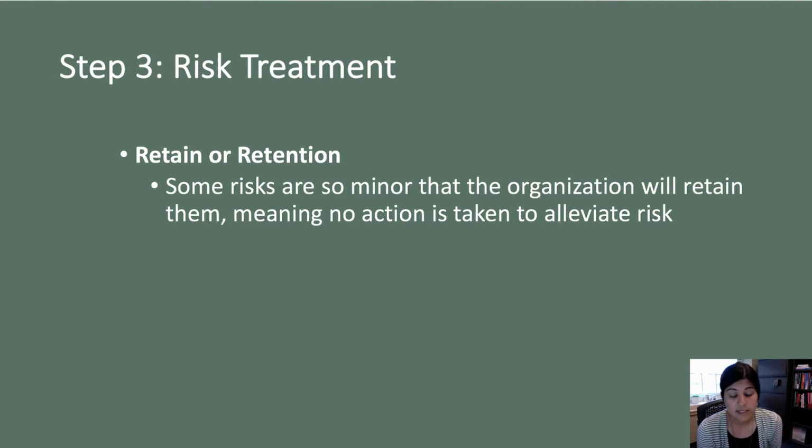So instead of taking action to reduce or eliminate or transfer that risk, we're simply going to retain it, right? Basically, we're not going to do anything. And of course, this isn't a method we should be using regularly, but for those risks that are minor and seem to not be something that is going to impact our categories of loss too much, right? There's not a whole lot of monetary loss, there's no physical harm occurring from those risks, then it's probably okay to retain them, right? Again, not something we want to be doing regularly when we're assessing risk, but there may be certain situations where the risk is so minimal that it's okay if we simply retain that risk.